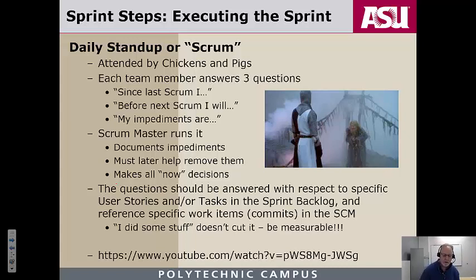As simple as that. Here's a very important point about the Scrum meeting, the daily stand-up, and I am going to emphasize this. You will be graded on this, and that's this last bullet here. That's very important. When you as a developer, you as a pig, answer the three questions, they should be answered with respect to specific things in your sprint.